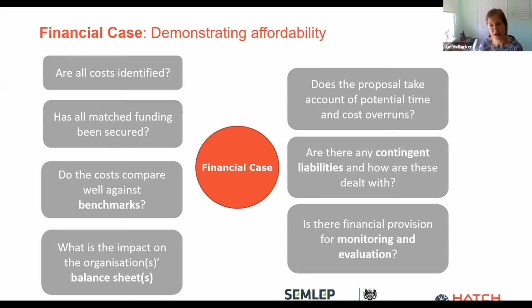And you do also need to be able to demonstrate that, as an applicant who is going to receive funding, your organisation has the cash flow or the strength and robustness as an organisation to actually make this project work. So that is important in terms of, have you got the right lead partner for this project that is sufficiently robust to be able to manage the cash flow in terms of how the grant is spent? Because if you've got, say, 50% upfront and only 50% at the end, can you actually manage the cash flow challenges of that? So you need to explore that.